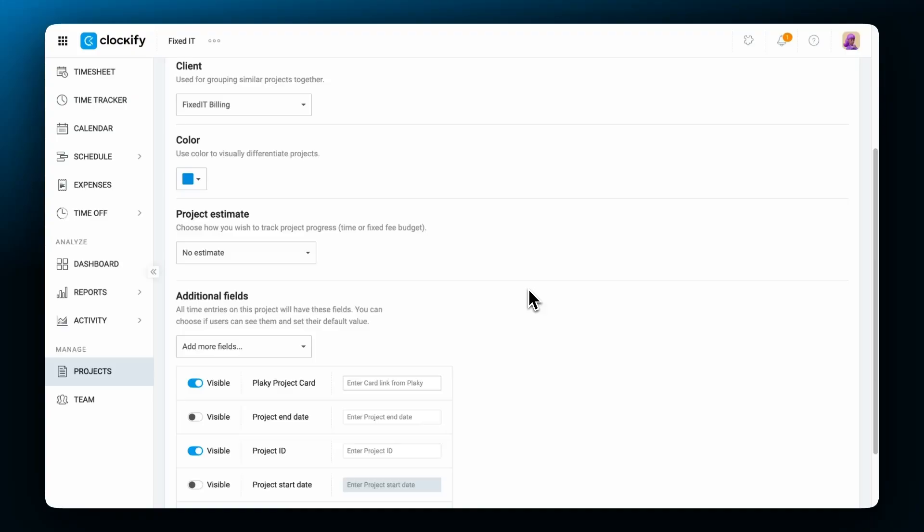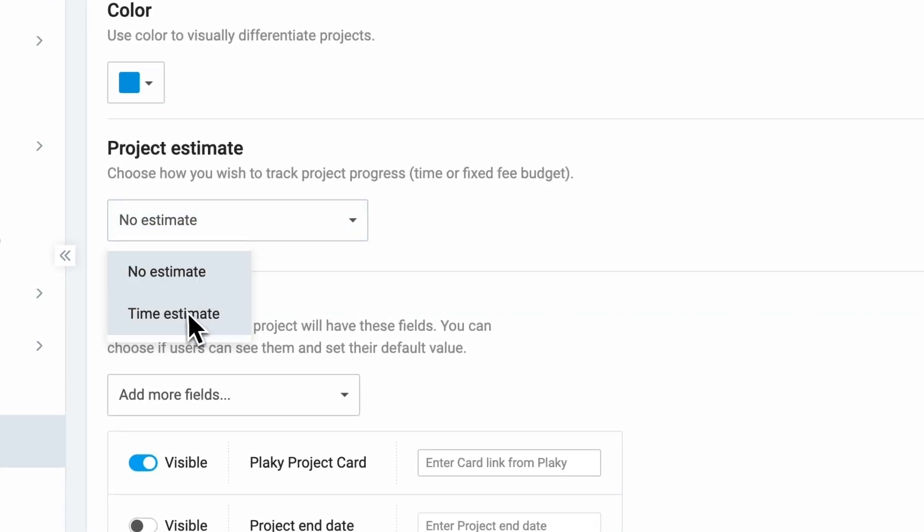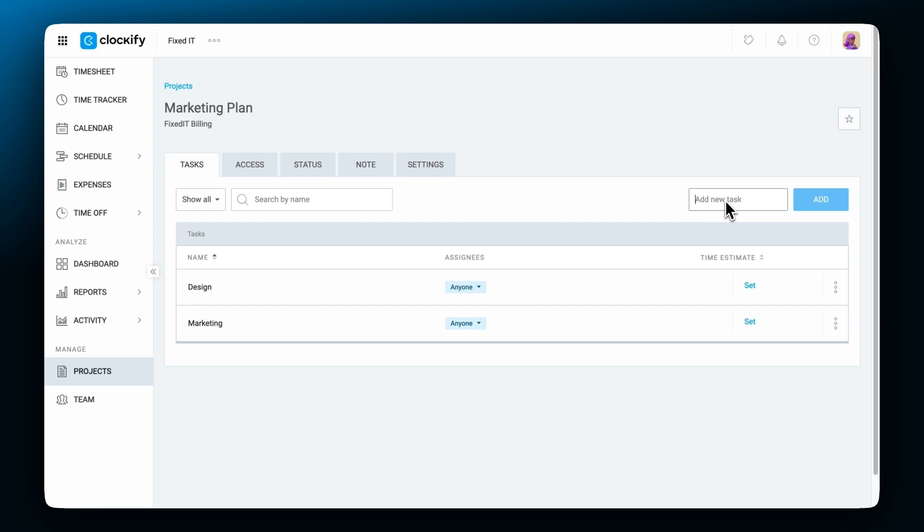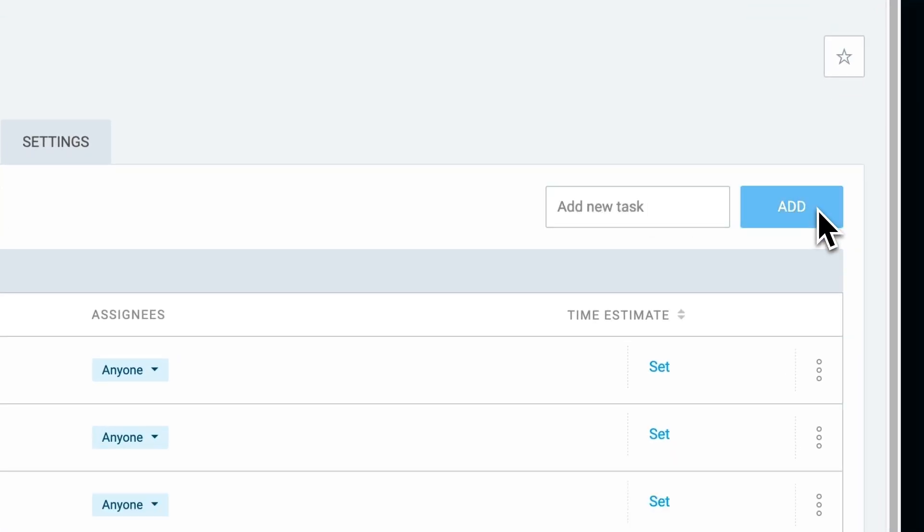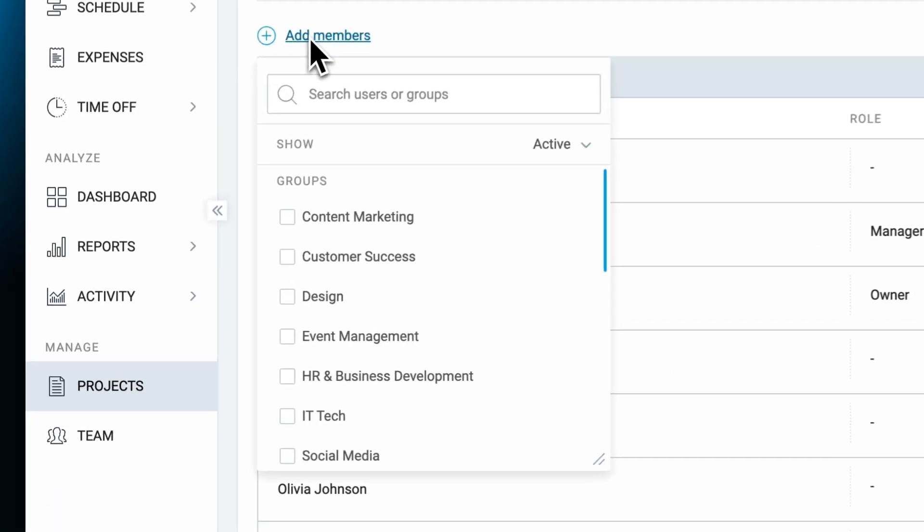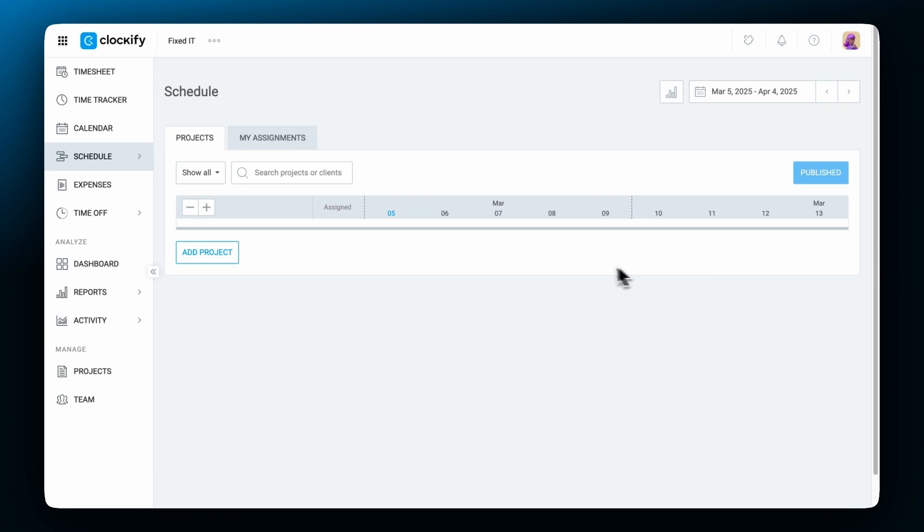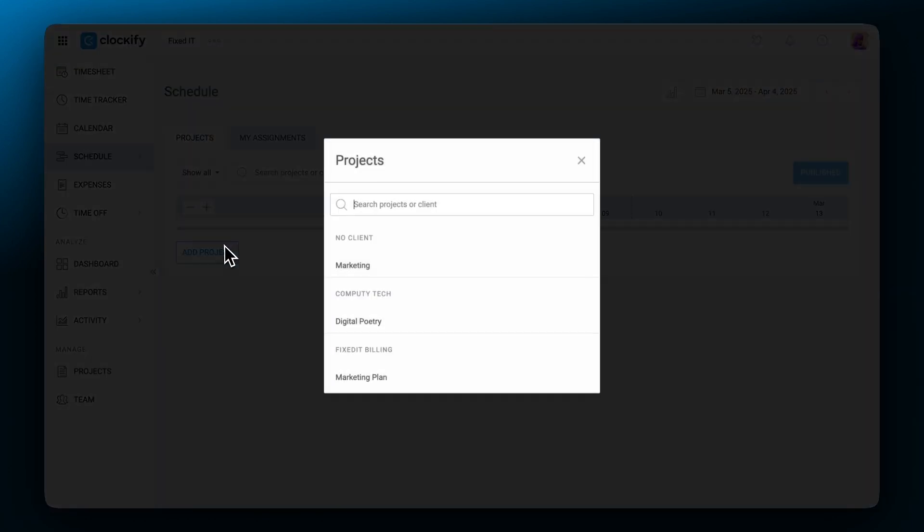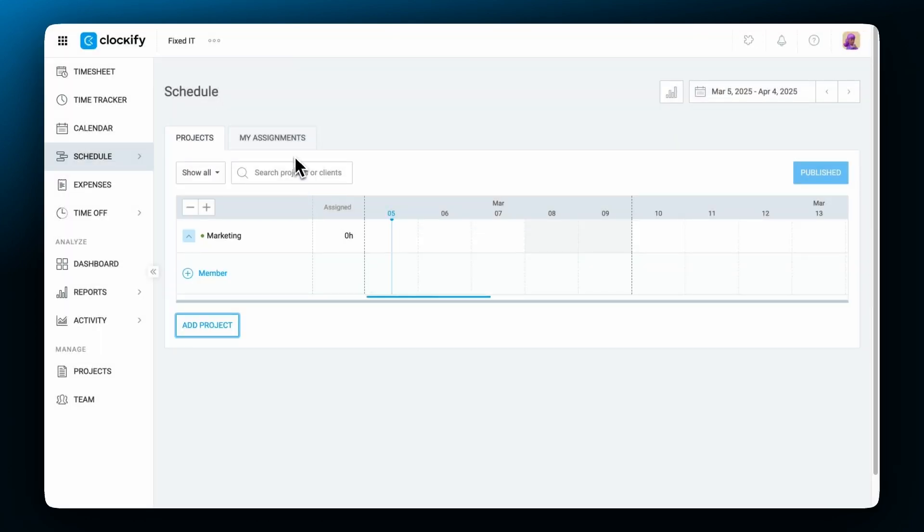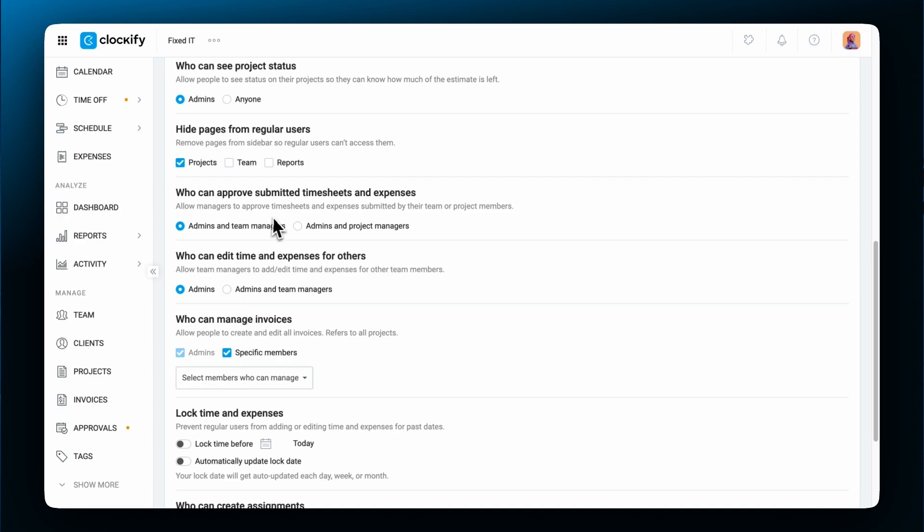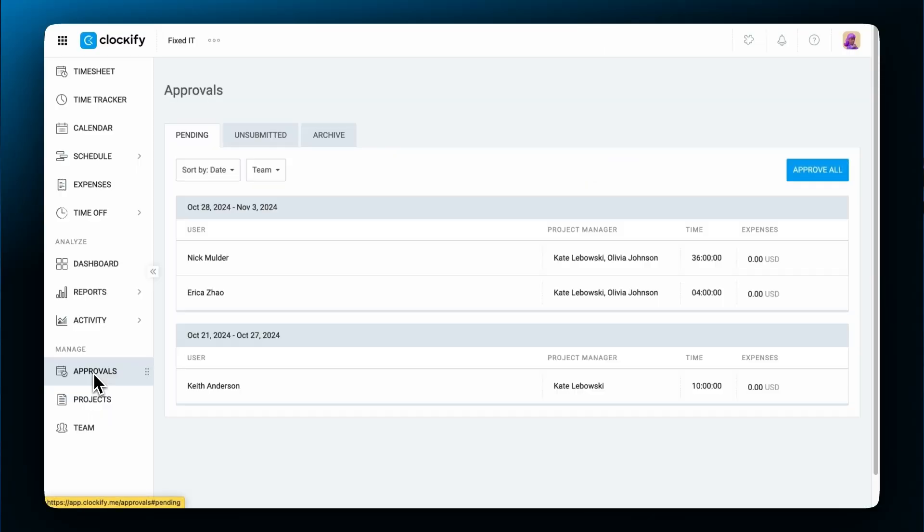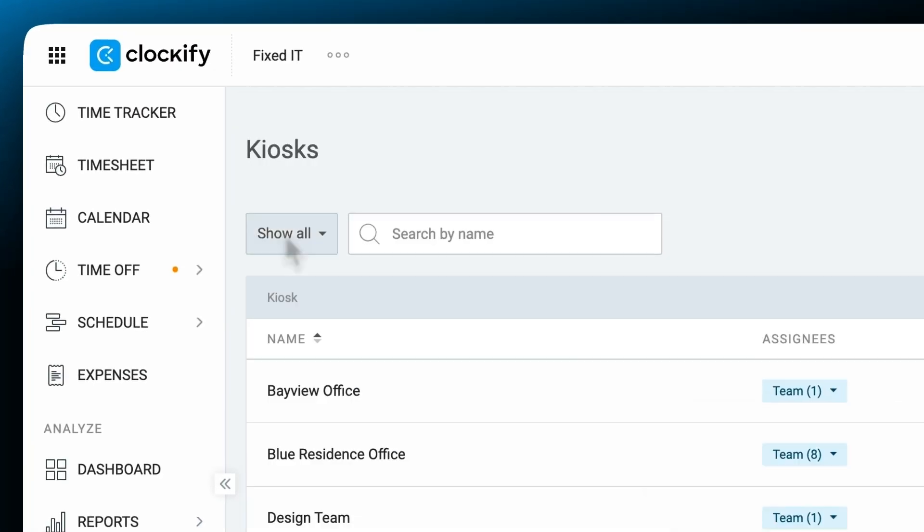Project Managers can see all tracked time on their projects and can edit various aspects of their projects such as set estimates, add tasks, manage project access, schedule their own projects and assignments, and, if enabled, approve submitted timesheets from members assigned to their projects, and launch kiosk.